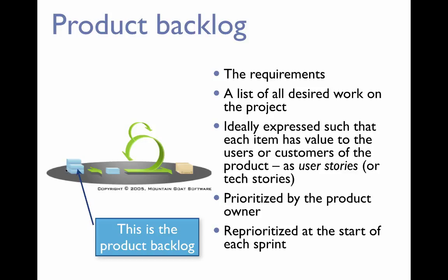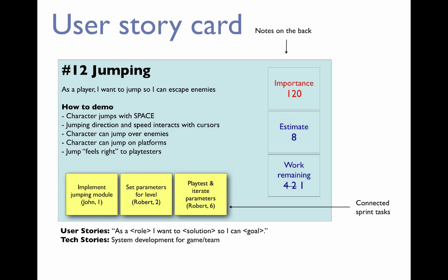So how are things formulated in the project backlog? They were usually formulated in the form of user stories. And if you work analog, if you have a big board where you put up all these stories, you typically note that on a card, but most of the software that you have that supports this process, like Trello, usually these cards are digital. Anyhow, every card represents something that is called a user story. A user story is a little story that just explains what a certain type of user wants to do to achieve a certain goal or value.